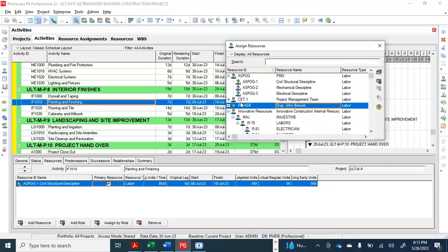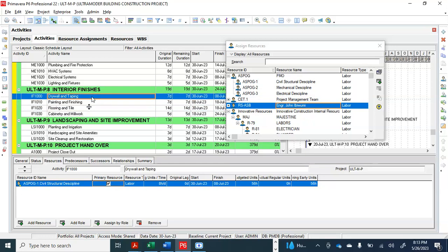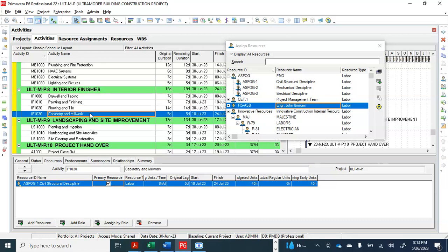That's what I'm saying. Okay, so I don't want to make the work tiring or cumbersome. That's why I'm doing it, so it will be easy for you. That's the easiest way: load your resources by team, by discipline. Don't put different names, just load it by team, so it will be easy for you. But if you want to add their different names and whatever, you can go ahead. Primavera has that space for you.